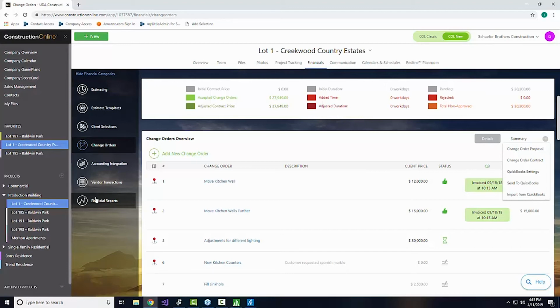We offer a lot. Number two, accurate estimates. Accurate, by the way, doesn't always mean that you've got the right price, but it does mean that you've got to know your price. Don't fudge the numbers. Always estimate accordingly and use things like line item markups or the right company overhead margin percentage calculation tools to give you the right result. The bookkeeper is talking about one number. You want to make sure that you match.